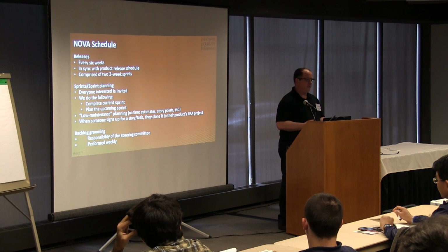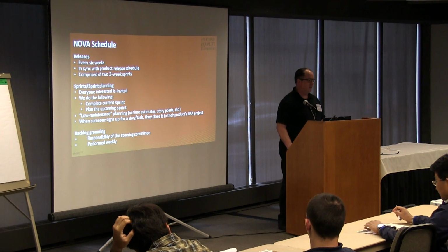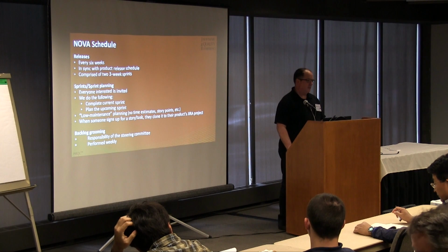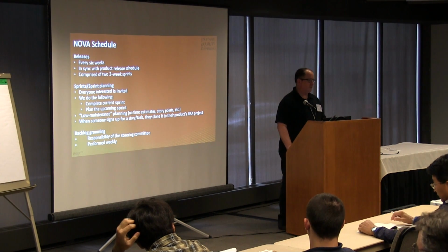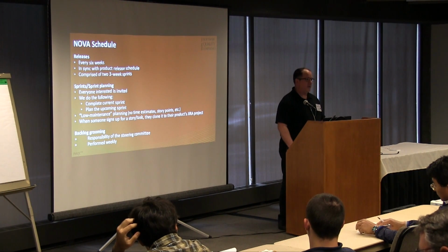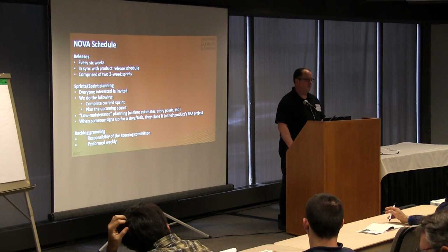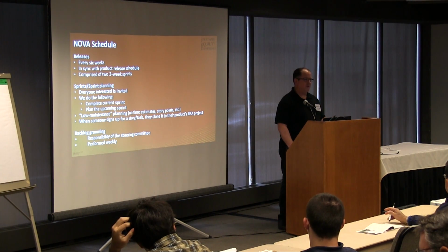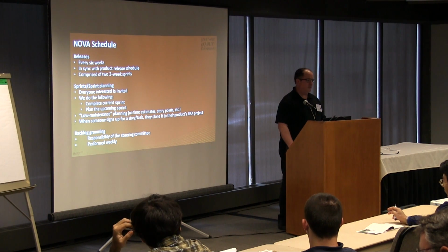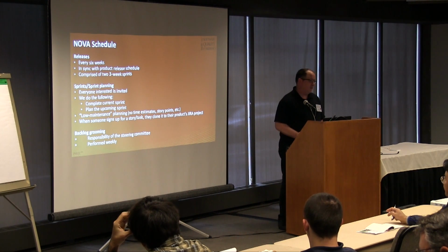Essentially, the way we do it is we look at the backlog, we say, okay, this is the top item in the backlog. Is there someone that would like to work on this? And someone says, yeah, I'd like to work on that. So we assign it to that person. After sprint planning, they will clone that story into their project's sprint so that their team knows that they're working on that thing, so they can allocate their time within their own team. And that's basically all we do.